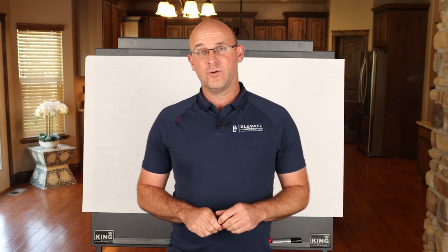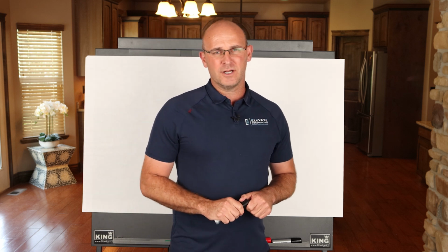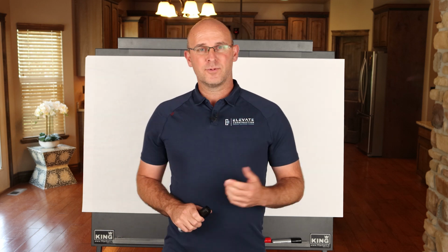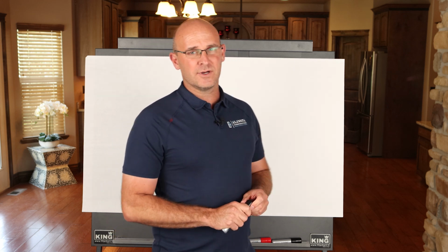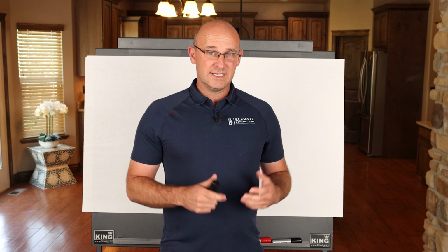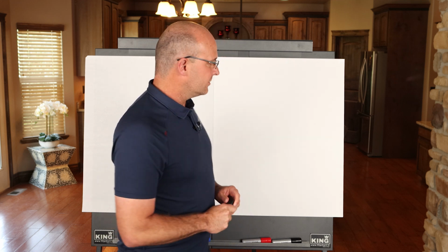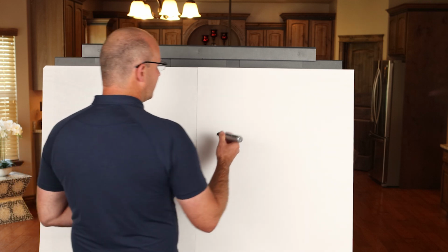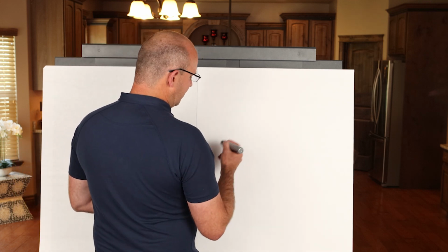Now let's go into how we actually plug it in to a project master schedule or the master plan. I like calling them production plans after reading Todd Zabel's book, Built to Fail, because it really is a production plan. It's not just a schedule. So we always do our construction production planning efforts in a time by location format.